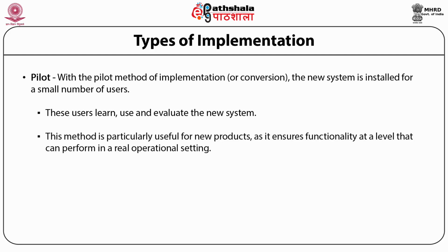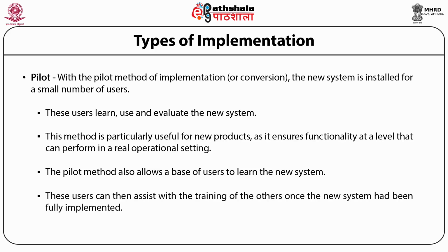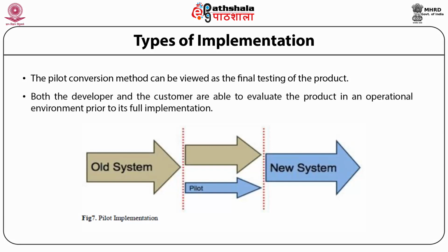Now this method is very useful for new products because it ensures functionality at a level that can perform in a real operational setting. The pilot method also allows a base of users to learn the new system. Users can then assist with the training of the others while the new method is being fully implemented. The pilot conversion method can be viewed as the final testing of the product. Both the developer and the customer are able to evaluate the product in an operational environment prior to the full implementation.